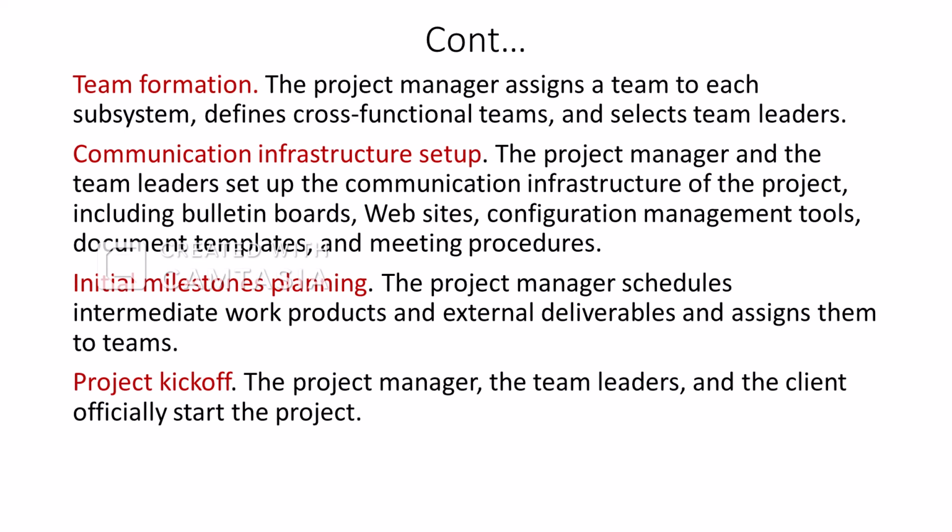There's also communication infrastructure setup in the project initiation phase. The project manager and the team leaders set up the communication infrastructure of the project, including bulletin boards, websites, configuration management tools, document templates, and meeting procedures. In this phase, we also have initial milestone planning.